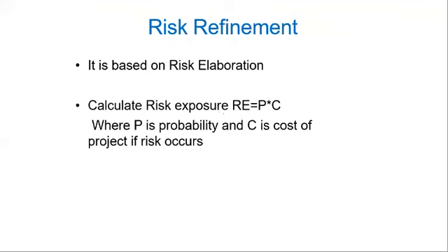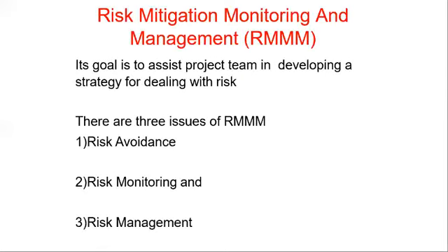Now, this risk refinement is based upon the elaboration. Now, you're going to calculate the risk exposure. That is going to be the probability and the cost of your risk. You're going to elaborate the risk. Now, this risk elaboration and risk identification is a very long and very critical process, so it requires computation of your risks based upon different formulas.